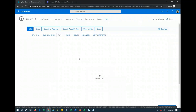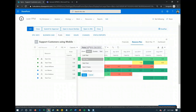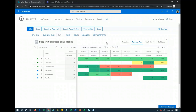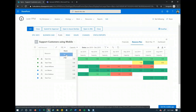To do that, I can utilize the OnePlan resource planner and financial planner. When building out my resource plan, I have a couple of different options. Right now I'm building this out by month — saying what resources I think I'm going to need and how much in any particular month. But you could do this by quarter or by year if you didn't want as detailed a plan. Right now we're looking at this in FTEs — full-time equivalents — meaning if I put a one in here, that's saying I need one full-time person. But I could switch to percent — 100% or 50% — or do it in hours.